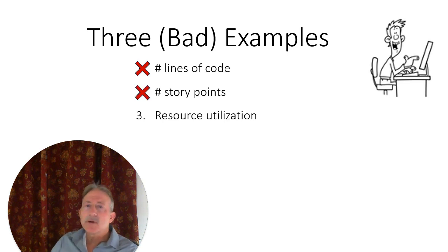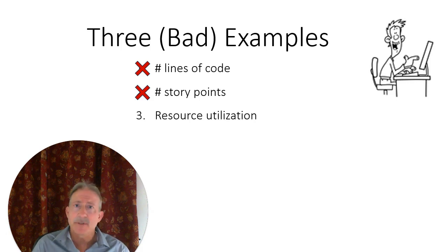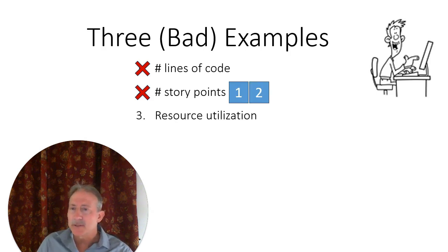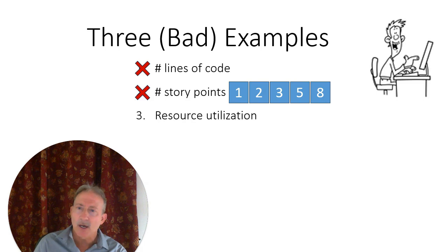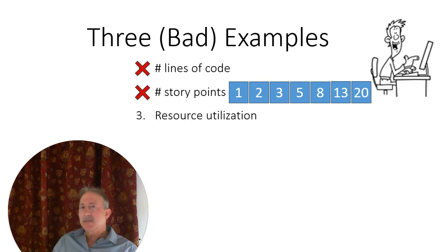Let's go to the next one. Story points. We know these are the Fibonacci numbers used to size up, on a rough order of magnitude, how big a story is, and then cumulatively how many points or how many stories a team could take on in a given sprint. So we see numbers that start real small, like 1 or 2, but if a team gets measured in story points, what's the likelihood they'll be motivated to increase those sizes and go up and up? Actually, it's a real phenomenon. It's called gaming the system. I've seen it personally. And so what we know is if those things are being tracked, and the higher the better, story points will probably go up. Not necessarily a good thing to measure.